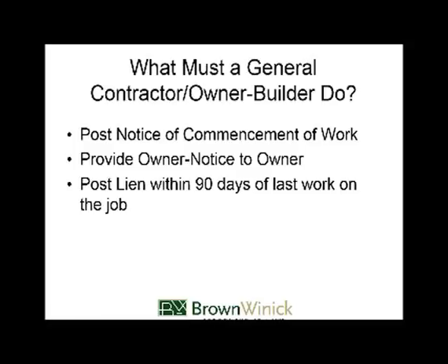Second thing, post the notice of commencement of work. Got to do these to protect yourself. Again, these are on residential properties. Third, post your lien within 90 days of last work on the job. This is the same rule as before.